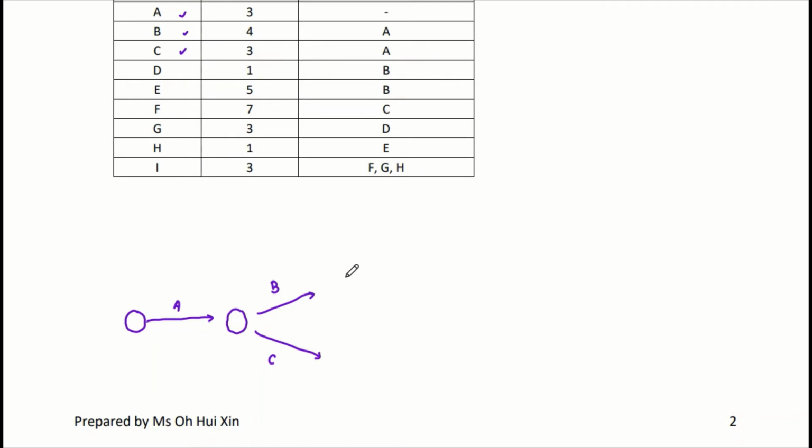So that's why we have our checkpoint B here. Then after that we can continue with D and also E. Now D and E finish. F comes after C. So after C is completed, you can proceed with F. That's why we have a checkpoint here. Then after that, you can proceed with F.